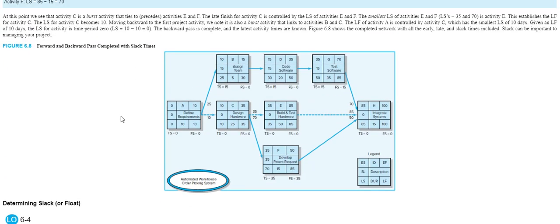With the results of both the forward pass and the backward pass, we see something important. We subtract the top left-hand corner from the bottom left-hand corner, or vice versa, to see what's the difference between these two. So A starts at 0, so there is no predecessor, so you see 0s in the left-hand corner of node A. But B begins at time 10, because A ends at 10, C begins at time 10.